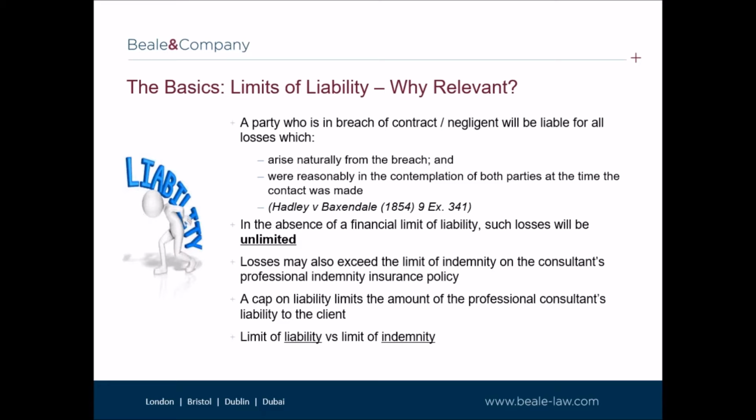Whilst the losses recoverable from a defaulting party will need to fall within the above limbs, in the absence of a financial limit of liability, such losses will be unlimited and may also exceed the limit of indemnity on the consultant's professional indemnity insurance policy. A cap on liability limits the amount of the professional consultant's liability to the client. As Will explains later in this webinar, this cap can be expressed in a number of ways.